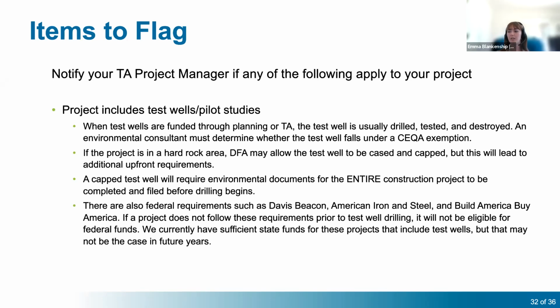Also, there's federal requirements such as Davis-Bacon, American Iron and Steel, and Build America, Buy America. If a project doesn't follow these requirements prior to test well drilling, then it won't be eligible for any federal funding. They'll only be eligible for state funds. Right now, we do have enough state funding to fund these projects that include test wells, but that might not be the case in future years. So definitely flag it with your PM and determine if you should be following those federal requirements. Otherwise, funding for the construction project may be jeopardized.